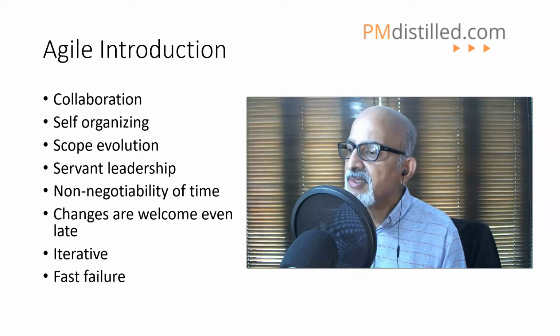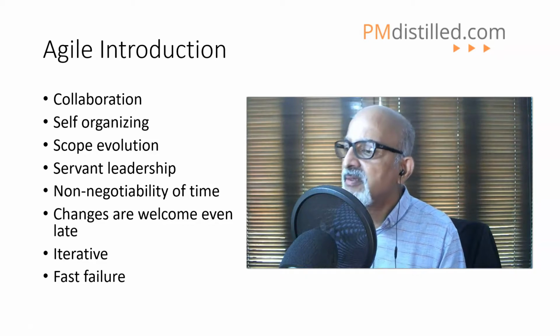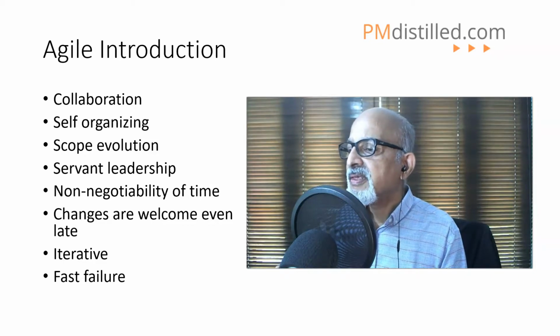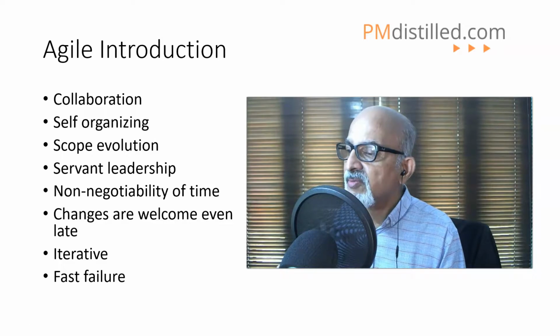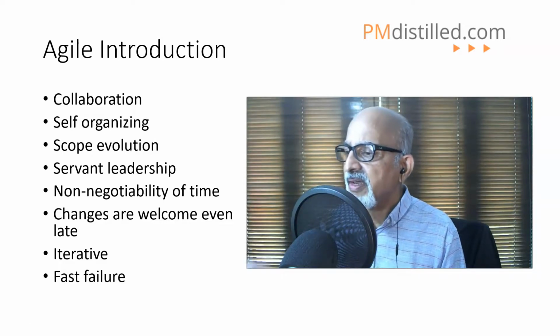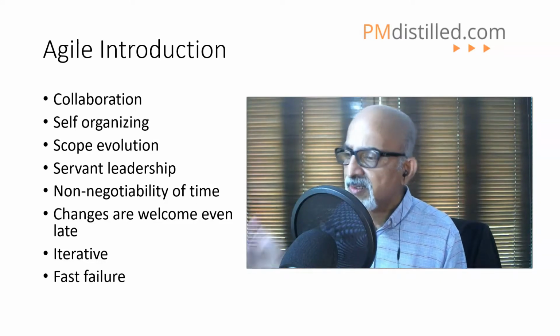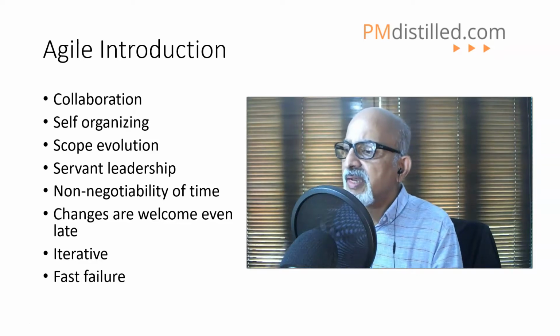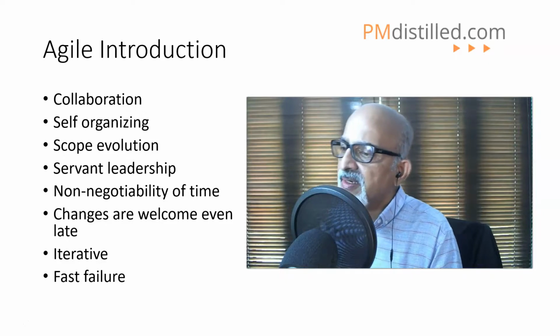Whereas Agile is for those projects where scope is just evolving and technology is not familiar to the team, and the ease of change is not very expensive, like software products, websites, maybe the engineering phase of a construction project. It can be easily changed. So those kinds of projects or phases within projects, Agile is applied.